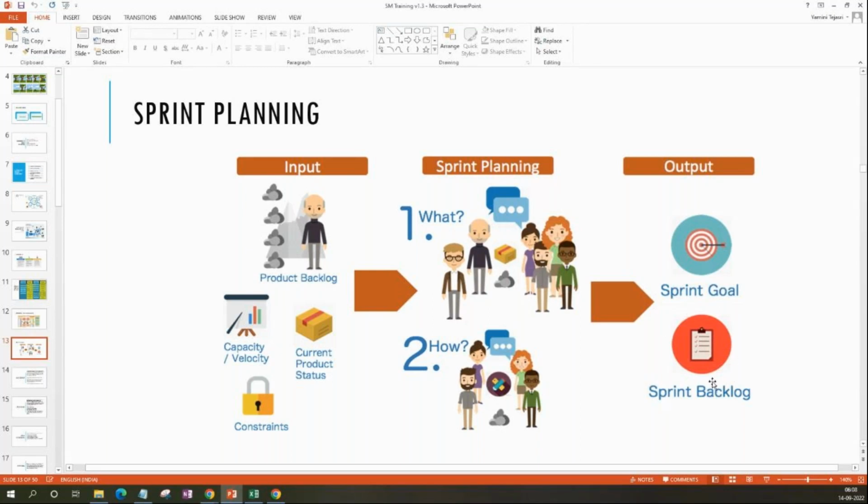Okay. So once you define the sprint backlog, then as a team, you'll all define the sprint goal. What is sprint goal? Sprint goal is a brief summary of what we'll be doing in this sprint. What is the goal of this sprint? For example, if you have picked stories related to registration and login, the goal of the sprint would be to complete the registration module for Instagram. Now, in one sentence, people will get to know what the team is working on. That would be mainly for the management, right? So the input is product backlog, and the output is sprint backlog and the sprint goal. Questions?